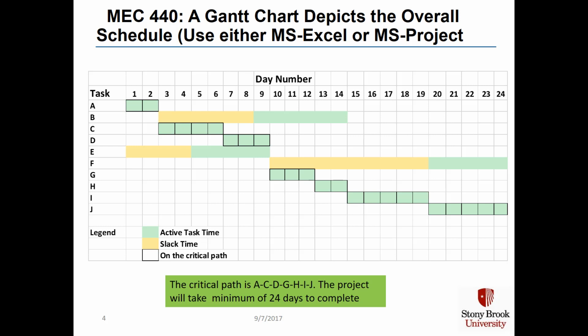The tasks are defined in the rows, and the dates are defined in the columns. In this chart, I put days in the columns. You can change that to weeks or months if more convenient. For example, given that your project will run from September to May, you could show 33 weeks worth of columns.